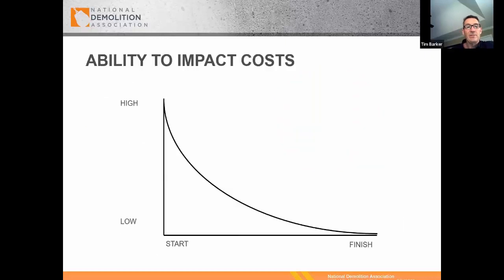process. If you understand early on that a project is losing money, your ability to make a change quickly will allow you to be able to correct that. If you don't receive that feedback immediately and the job's over, there's no opportunities for you to correct the issue. So again, having a very timely, ideally weekly system set in place for multiple week, multiple month projects to know where you're at is valuable, so you can make the changes as needed.